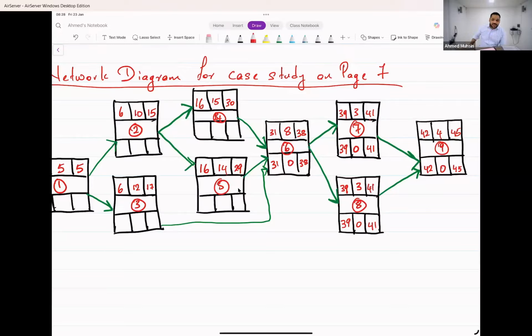No worries, come to task number 5 below. Everybody, task number 5. When is the latest it can finish? Did you all understand why I said 30? It has to finish by day 30 because the late start is when? Day 31, right? Day 31 only task 6 starts. The latest that this can finish is on day 30. Agree? So I'm going to put 30 over here.